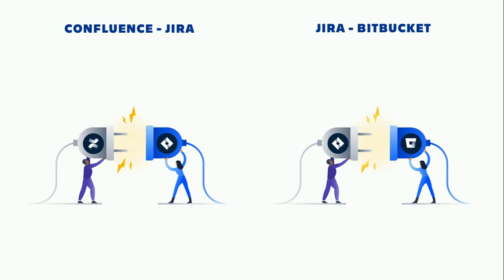And once we moved our repository, we had a repository on-prem, then we moved to a Git repository in Bitbucket Cloud. The first thing we did is integrate Bitbucket and Jira. Again, simple, easy steps to integrate. So this gave us a seamless integration between the issues or stories you have in Jira and the code that you push for one individual user story to Bitbucket. Okay. These are very small changes, but this really made a big impact.